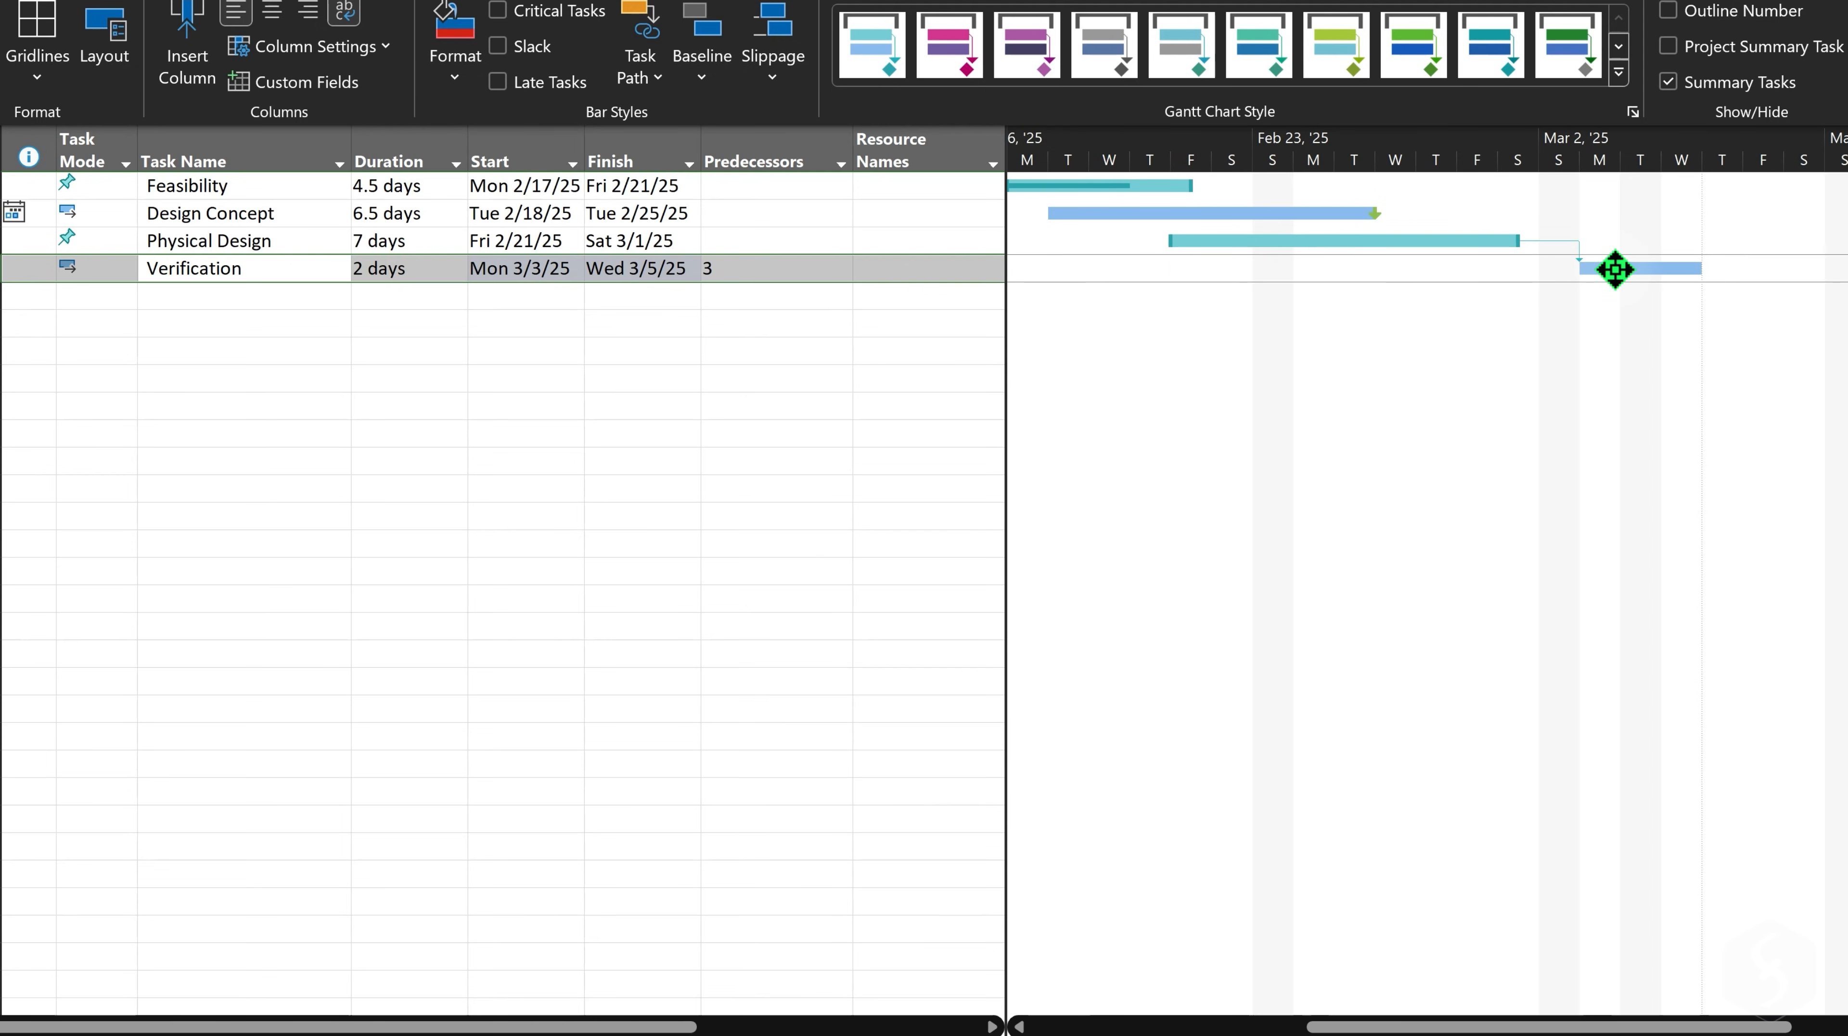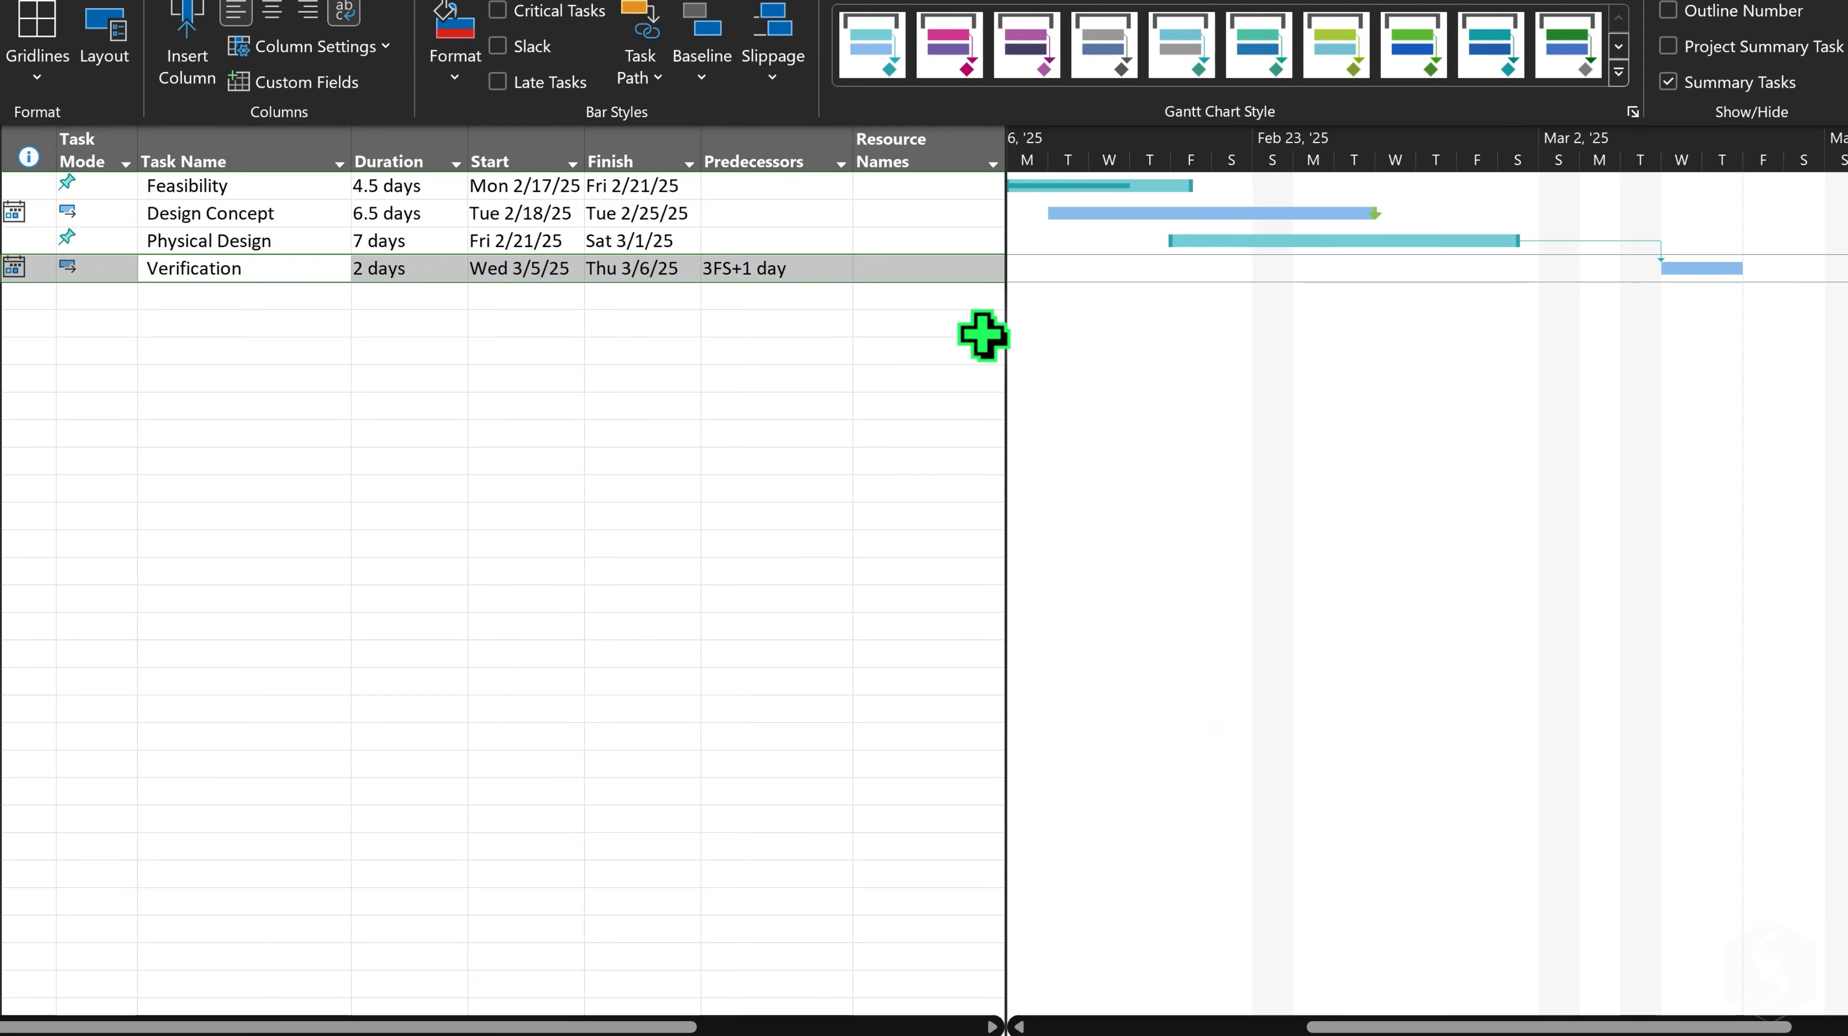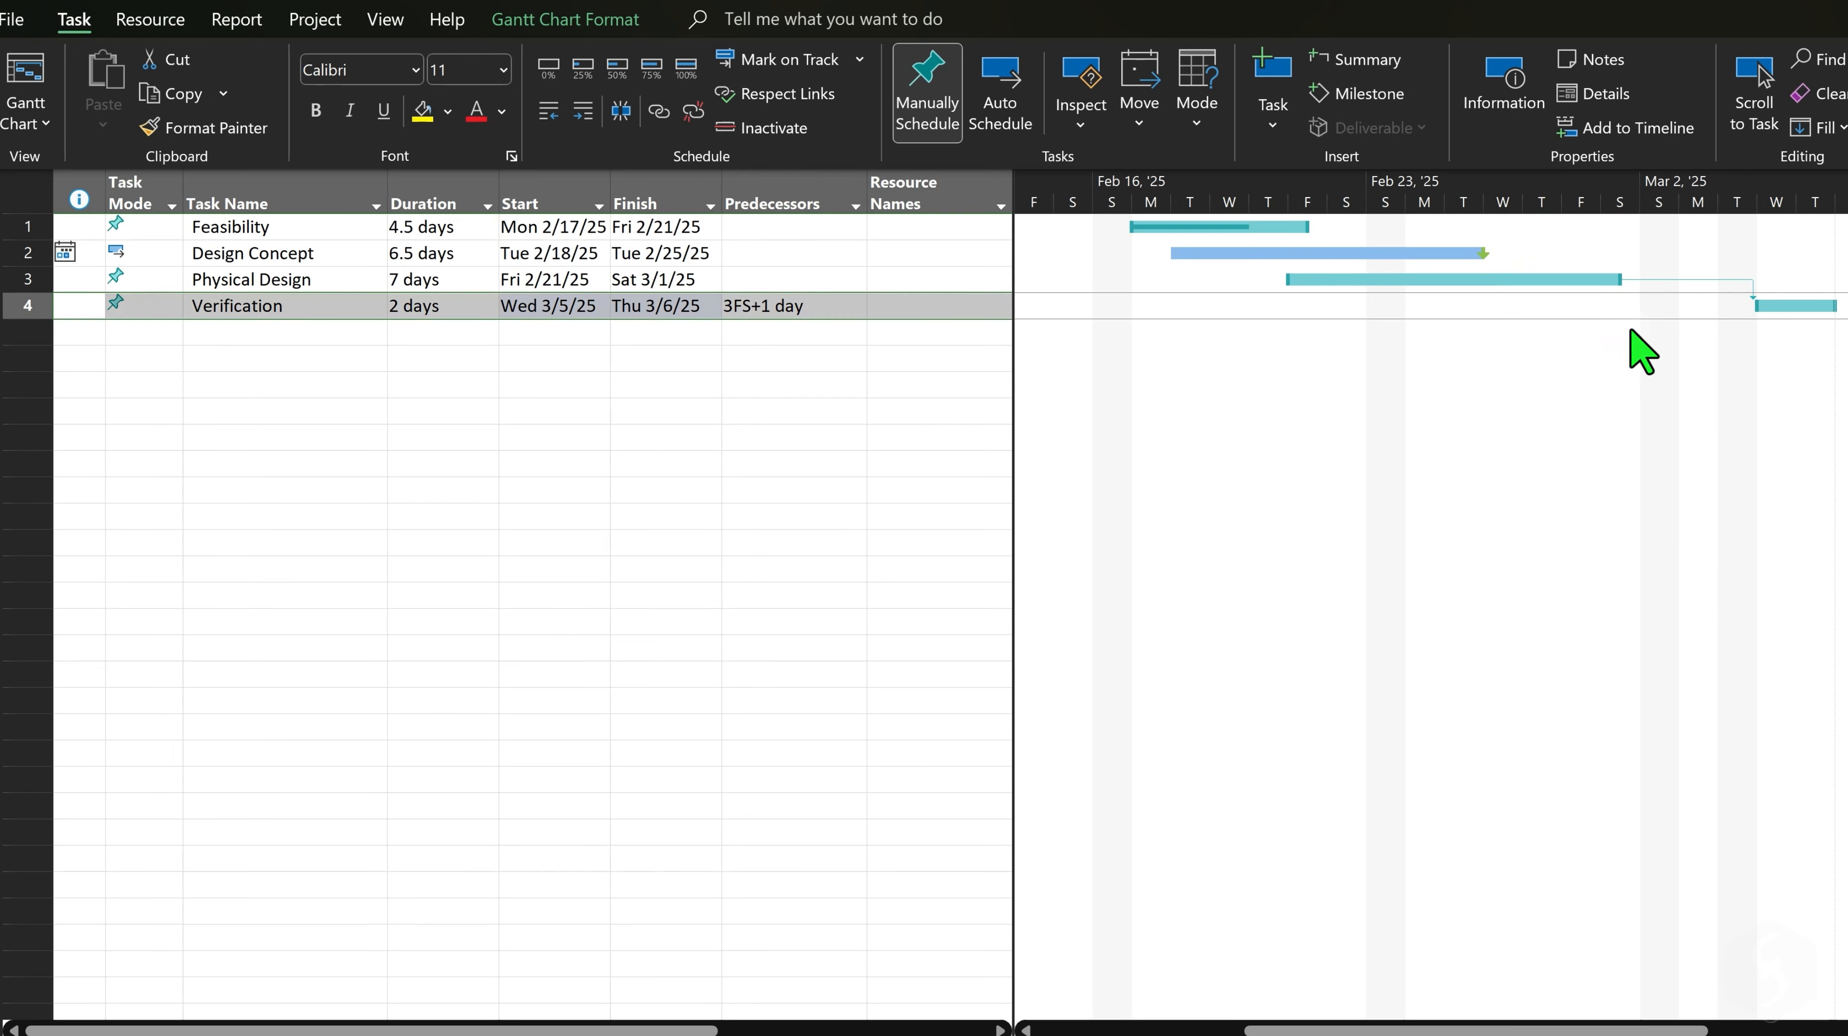You can still move linked tasks, however, the lag value may not match what you have on the Gantt chart anymore until you correct it. On manually scheduled tasks, dashed bars may appear if the task does not respect the links. In this case, right-click on the task and go to Respect Links to correct the error right away.